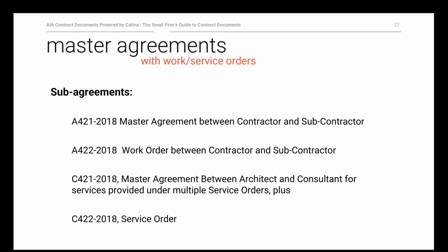if as architects, you have a particular relationship with an owner, rather than negotiating or renegotiating a B101 or even a B105 multiple times, you can say, look, we both agree that these are great working terms. We've negotiated everything. We've made some edits to this master agreement that you like, that we can live with project to project. Why don't we just enter this agreement?